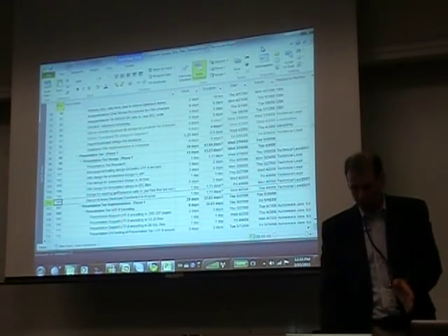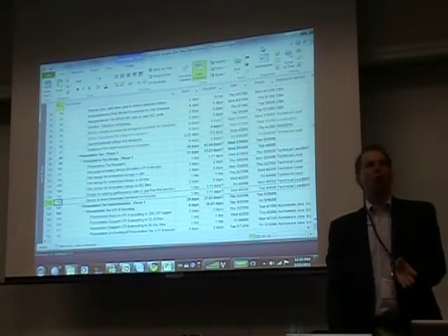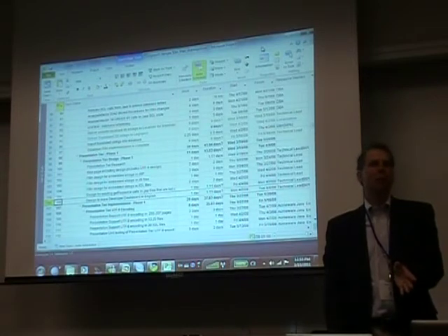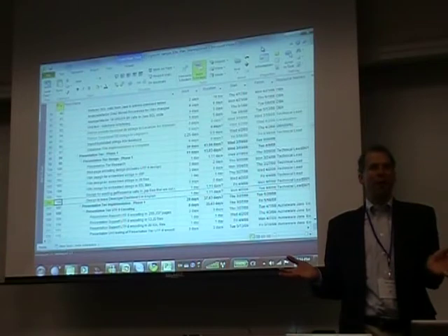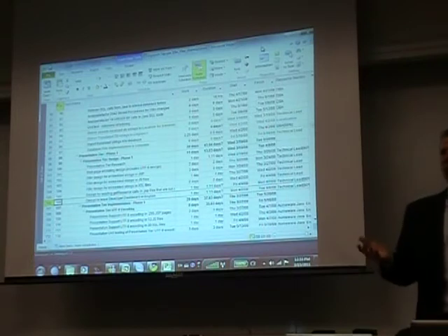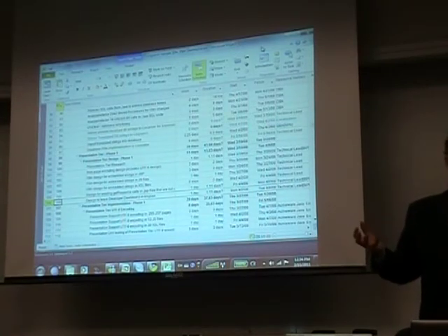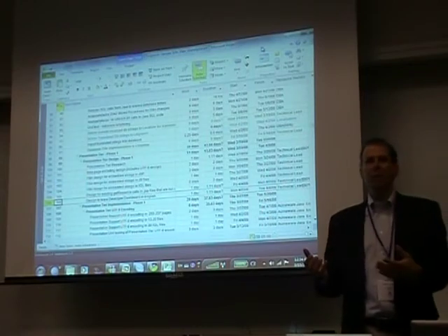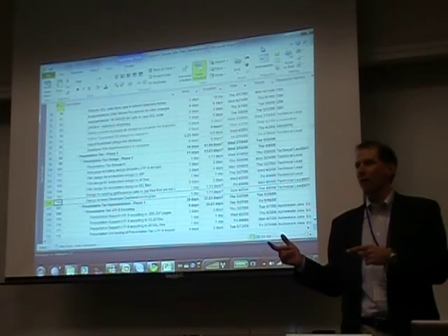And in this case, it looks like we were leaving the developer dashboard in English. Sometimes you'll see, as a scoping issue, you might leave the admin portion of an application. So the administration portion, you say, oh, it's always a systems IT person that will be using that, and they always work in English, so we're going to leave that out. There's a whole argument there whether that's appropriate or not, but that's a different argument. Sometimes in an imperfect world, we just have to get stuff done faster, so we leave parts out of scope. But at least let's make sure that what we're doing isn't going to break how that part of the code works.